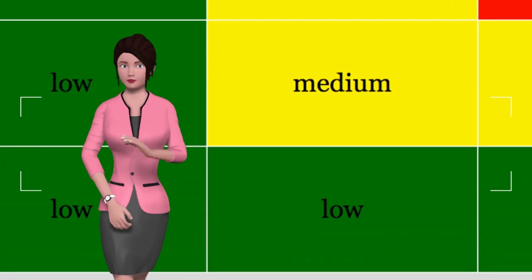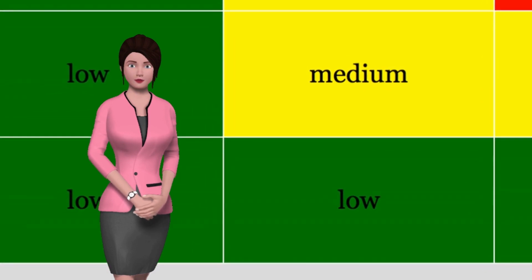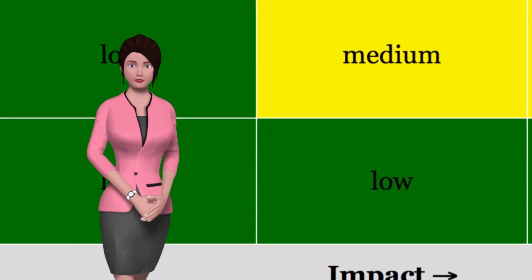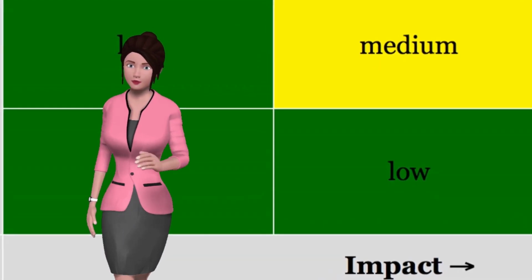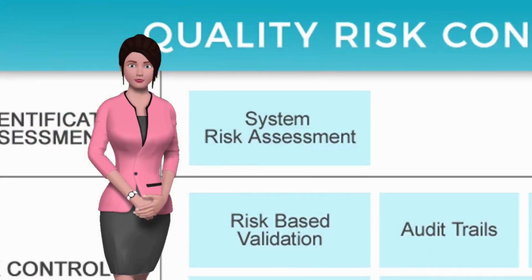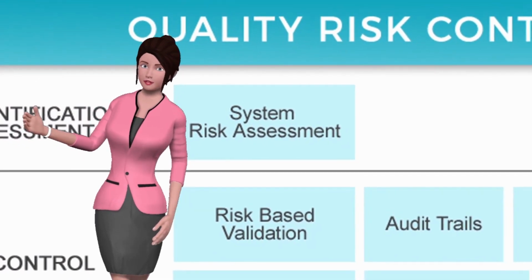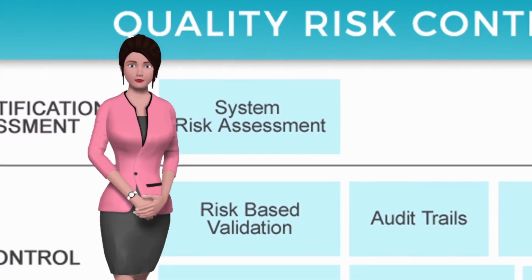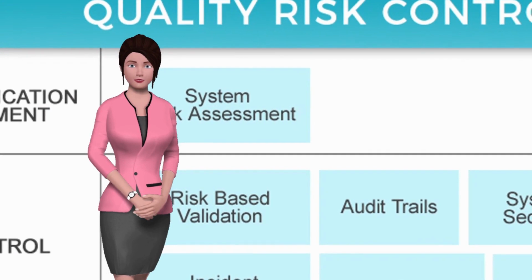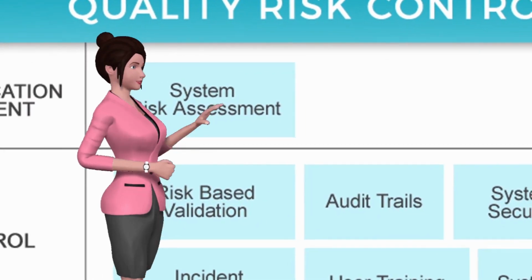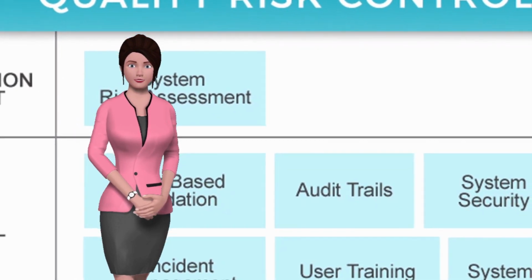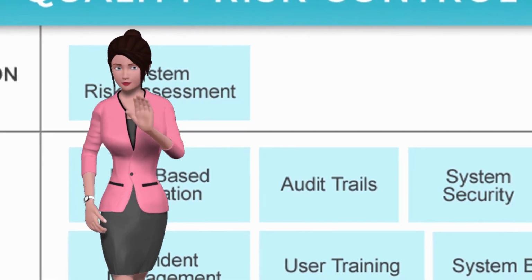6. Risk data quality assessment. With a risk data quality assessment technique, project managers use data that has been collated for the risks they've identified. This is used to then find the level to which information about the risk is relevant to the project manager. It helps the project manager understand the accuracy, reliability, quality and integrity of the risk as related to the collected data about it. For each risk listed, the risk data quality assessment requires that the project manager determine the extent of the understanding of the risk, collect what data is available, what the quality and reliability is for that data and its integrity. It is only by examining these parameters of the risk can an accurate assessment be reached.